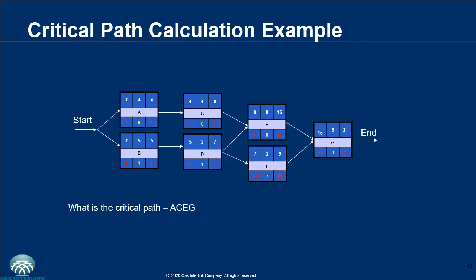And so to know the slack for each of the activities, you could do either late start minus early start or late finish minus early finish.